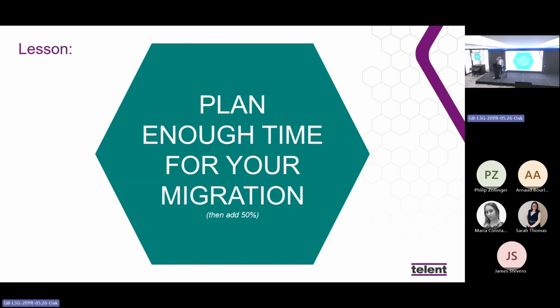your migration, add 50%, listen to the optimized team. Like, I think we put them under the cosh quite a bit because of our delays and the whole migration. 50%. Most people don't need to add 50%. I think we were in a special level of chaos at the time.